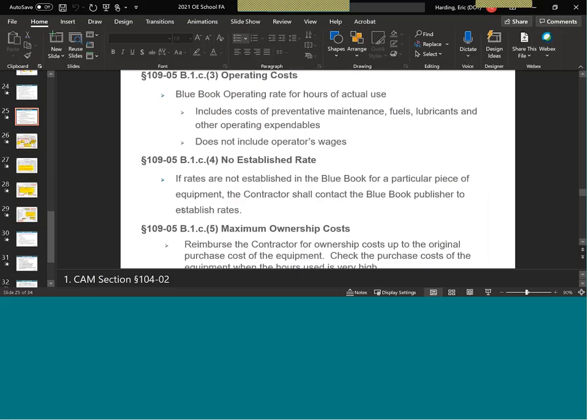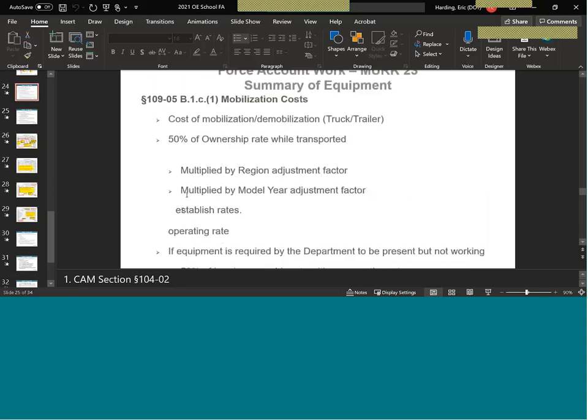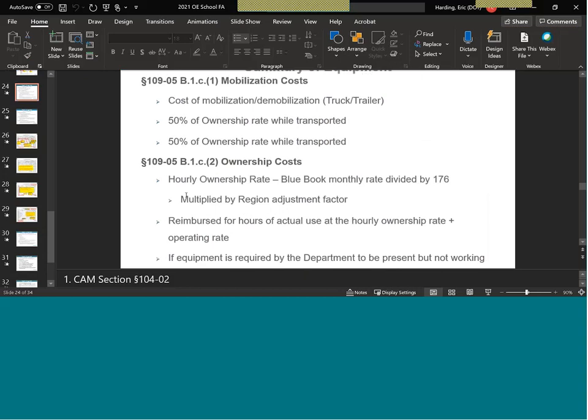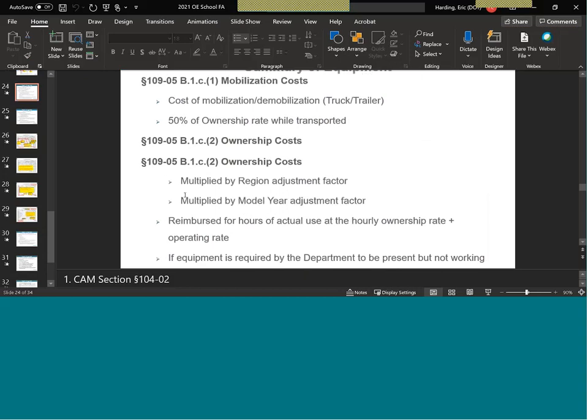If the sub is less than 10 days, payroll should be theirs or Prime's payroll. If a sub is a sub, again, if a firm is on site performing work and they have been deemed an approved subcontractor, they are responsible for all of their own management. They need to provide certified payroll, they need to provide proof of the various types of insurance, and if they're on force account work, they need to provide their own labor, material, equipment, and insurance breakdowns for that work. A sub is a sub, period.